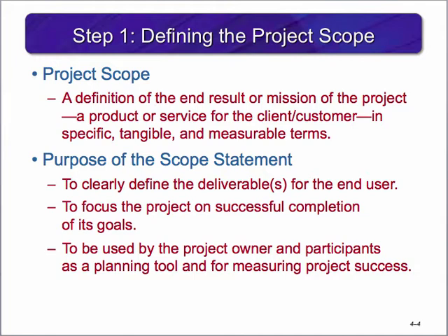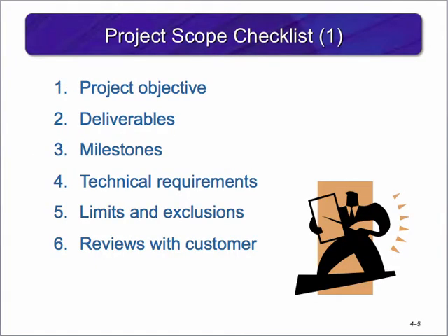Why is a scope statement important? It helps to clearly define the deliverable to the end user and project sponsor. The statement focuses on successful completion of the project and is used to measure project success. But what happens when there isn't a clear project scope? Research shows that 50% of project planning issues relate back to unclear definition of scope and project goals. The project scope is the most important document of the project plan.